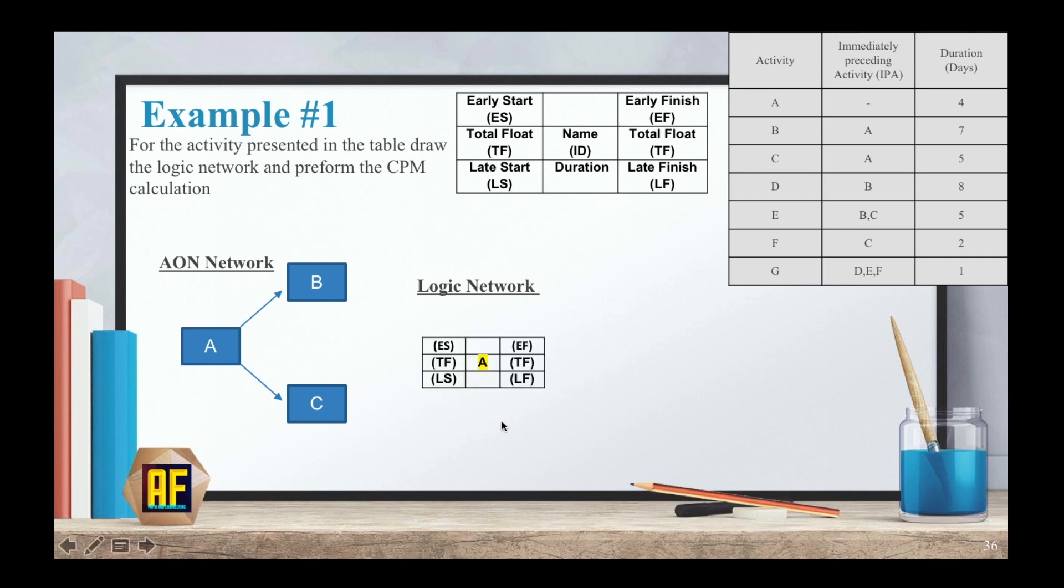So a logic network, we take the same A and we write it over here. And here we write the early start, total floats, late start, early finish, total floats, and late. And we start by writing what we know. We know that the early start is zero because A is our first activity. So that is our early start. The duration of the activity is four. So zero plus four equals EF, equals the early finish. The earliest this activity could start is after four days.